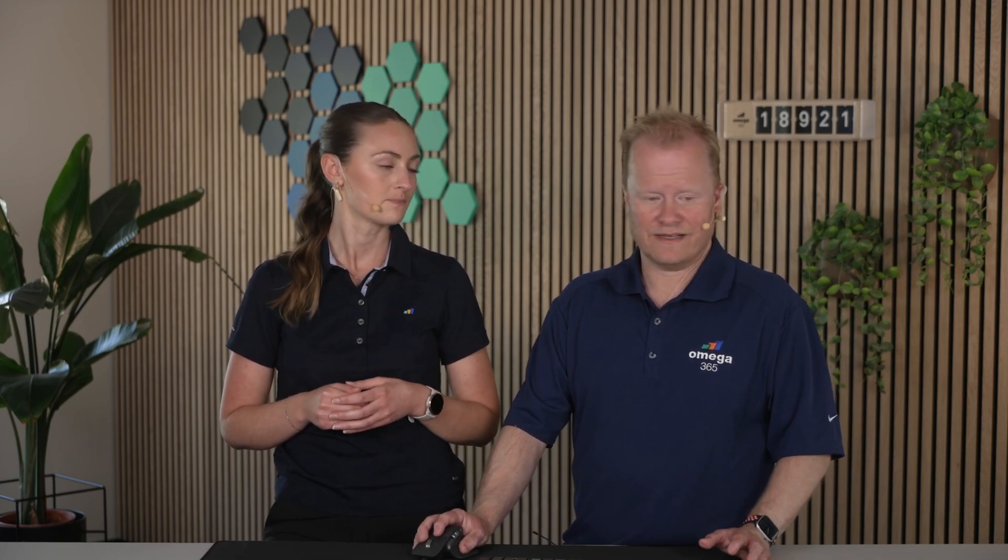TAC planning is a lean construction method that focuses on creating a steady and continuous workflow by dividing a project into zones and allocating activities with specific timeframes. It allows teams to identify bottlenecks, obstacles, and inefficiencies.